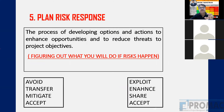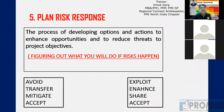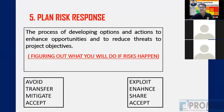The fifth process is Plan Risk Responses — developing options and actions to enhance opportunities and reduce threats to project objectives. For negative risks (threats), there are four response strategies: Avoid, Transfer, Mitigate, and Accept.